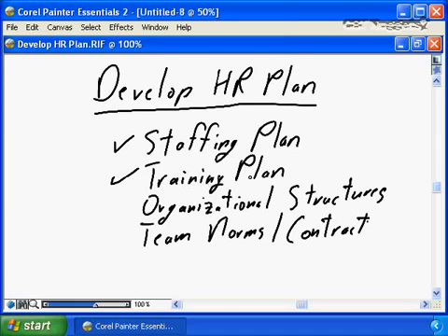Do you need to provide training to your team to provide additional support, additional knowledge, additional skills to the people that were identified and staffed to your project based on the plan to ensure that they are equipped to deliver the tasks assigned to them on the project? You need to develop efficient organization structures. You need to ensure that you have a project organization in place that recognizes span of control to make sure that the teams report to leaders who have the knowledge, the skills, and the authority to manage the team, that the teams have appropriate scope of control, that the teams work on a consolidated focused area, that the team leader has the appropriate number of resources reporting to them. Again, a norm being no more than 7 to 8 resources reporting to a leader, that you have an effective organization structure in place for your project, that the teams can work effectively.